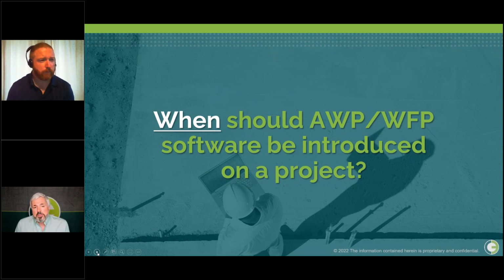So the real answer is that true AWP software should be brought into the project at the same time as AWP itself, which is during concept select. So the very earliest parts of the project when you're setting up the project for success. But if the project's only using workplace planning, then the software can be implemented shortly before construction starts.